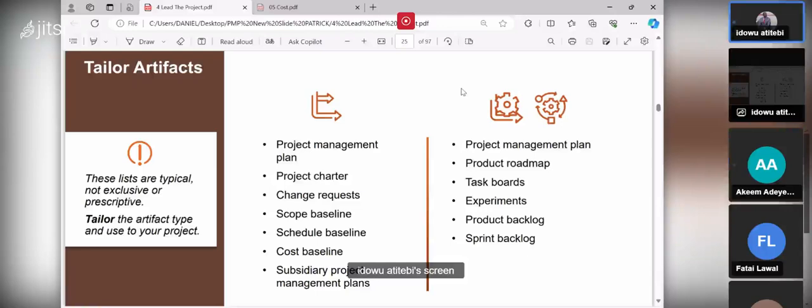What is the quality of the project? What are the constraints and challenges we are going to have in the project? Who are going to be the key stakeholders? Who is the project manager that has been assigned to the project? What are the rights and authority of the project manager? And what authorized the project? That's the project charter. You created it in the project. It's an artifact. It must be made available whenever it is needed. It contains the objectives, limitations, constraints and assumptions of the project, and other important information about the project.